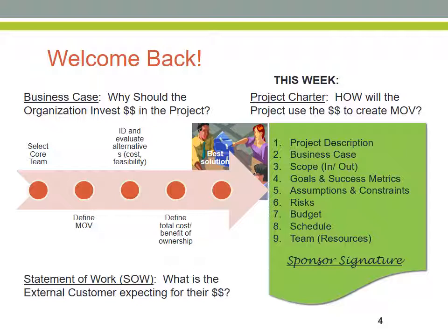It also can come down from an external company if you're working for a consulting organization through a statement of work, meaning a statement of work defines what an external customer is expecting for their funding, and this statement of work often comes to a project manager who is outsourced that way, together with a project charter that will contain exactly the same information as a project charter that comes down through a business case.